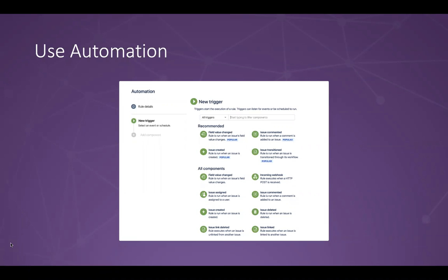And so if we make these assumptions, then we can build in automation to create and validate that, which means that you can't create an epic, click create, without filling in the owner field. You can add a default for that, just to have messages that get triggered and sent to different people. And doing this allows you to not have different issues that can be created by one team that slip through the cracks because someone else is filtering by owner and they don't see it.